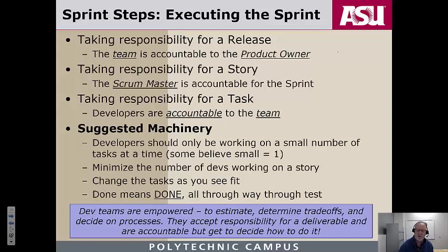So at the end of the sprint planning session, you'll be asked to define what are the initial set of tasks you think it will take to get that done. Again, say the user story is I want to produce a database migration script to go from version 7 to version 8. And initially, the set of tasks might be, okay, investigate the export to XML function here, transform some of the artifacts in the file system so that they move over here, maybe write a shell script, I don't know, and then turn around and write an import feature, making it up.